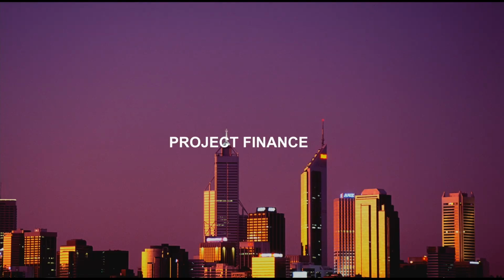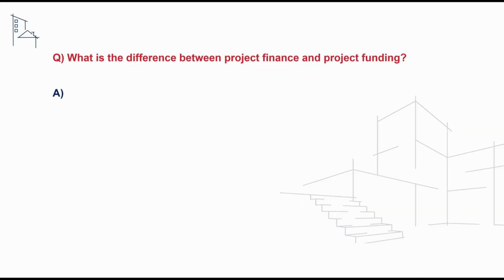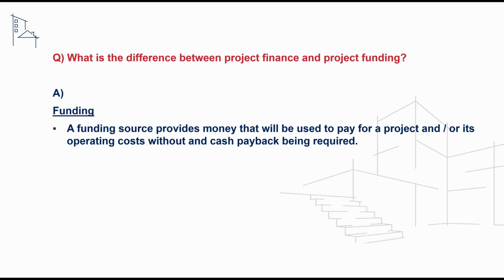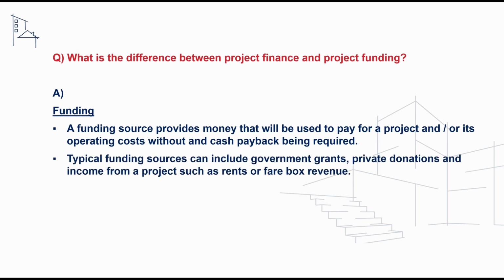The next question we'll take a look at is on the project finance competency. What is the difference between project finance and project funding? And to address this, we can say that funding is a source providing money that will be used to pay for a project and/or its operating costs without cash and payback being required. Typical funding sources can include government grants, private donations, and income from a project such as rents or farebox revenue,